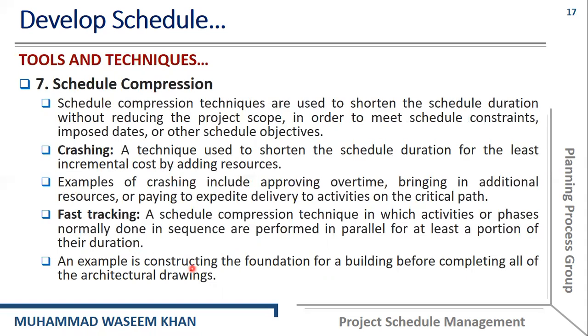Another tool and technique that we can use in the project is schedule compression. Schedule compression techniques are used to shorten the schedule duration without reducing the project scope in order to meet the schedule constraints, imposed dates, and or other schedule objectives.